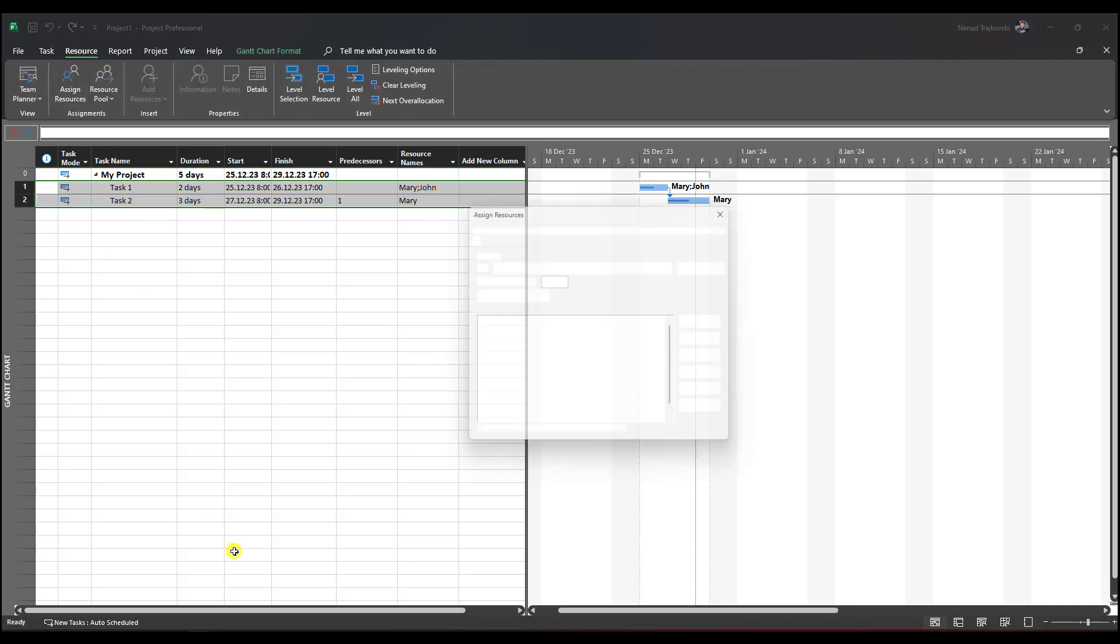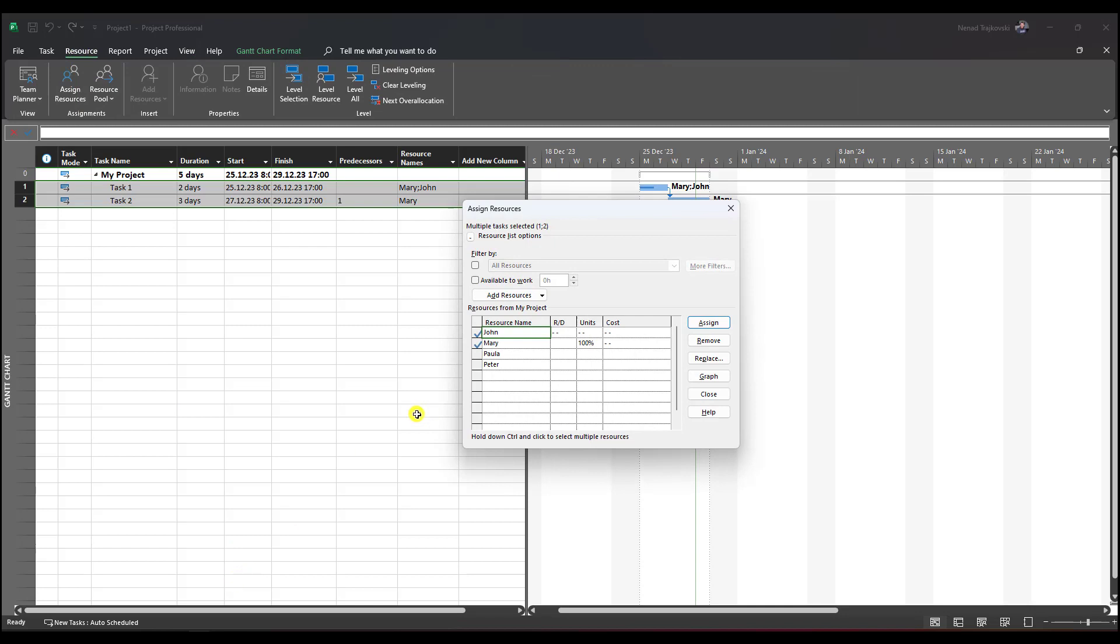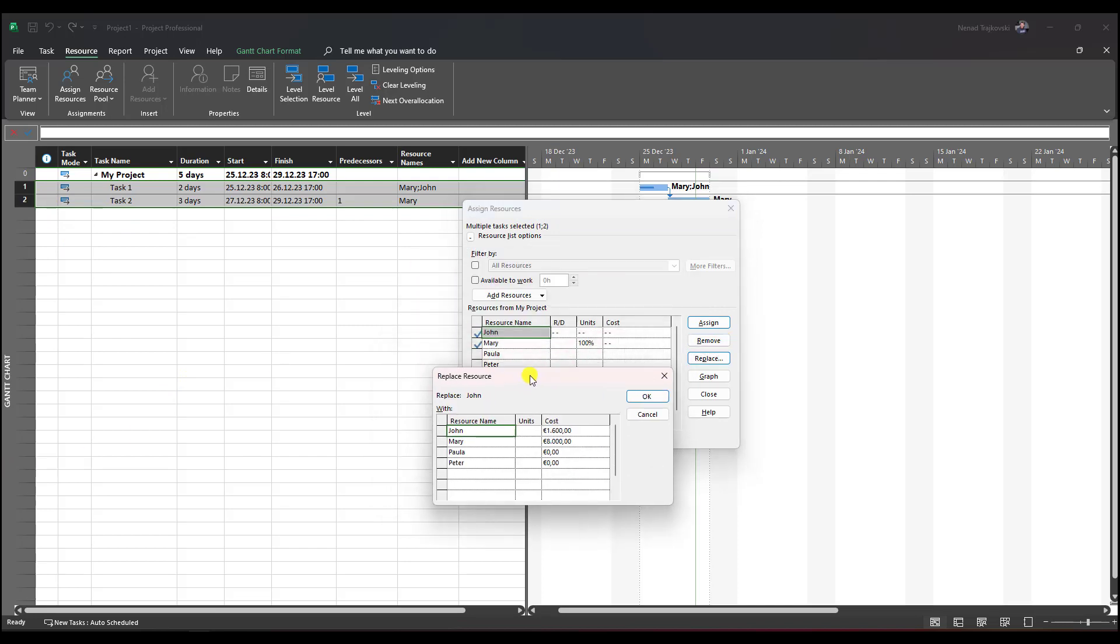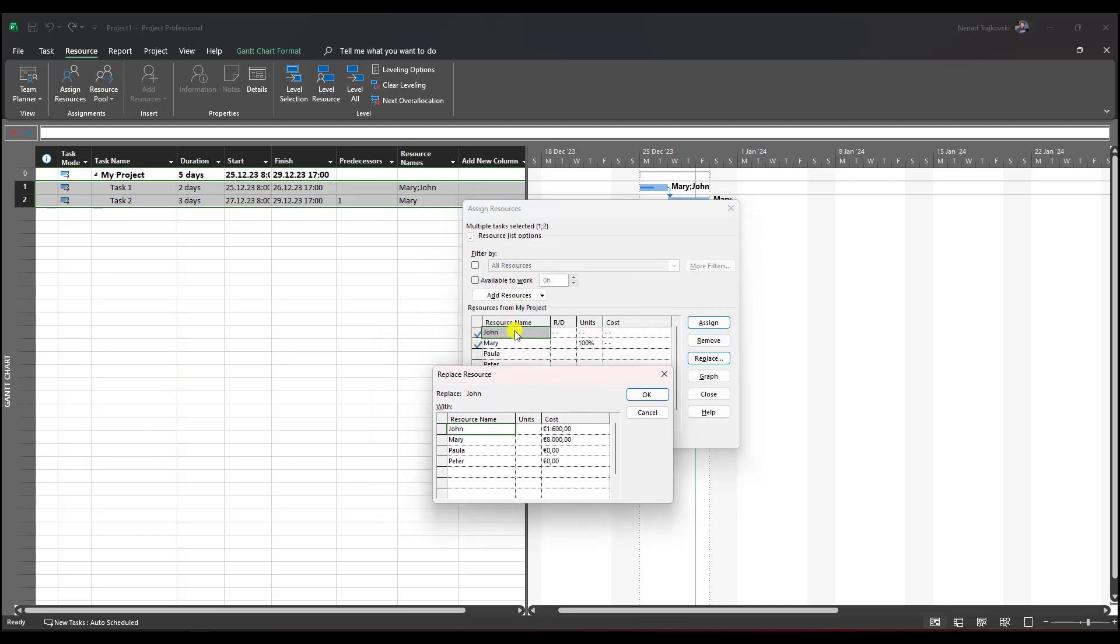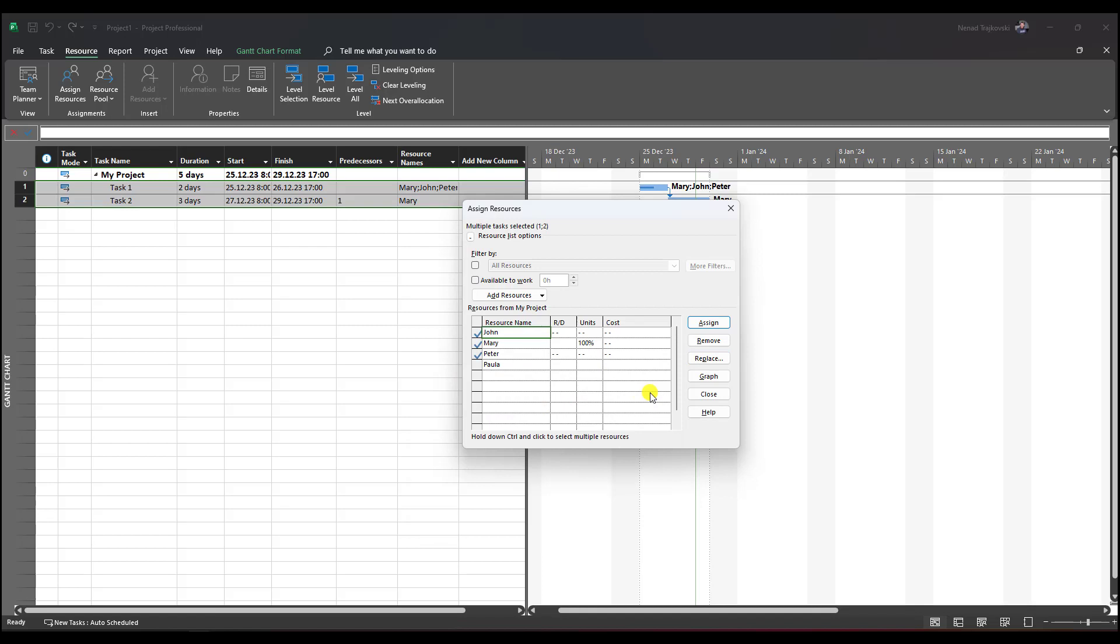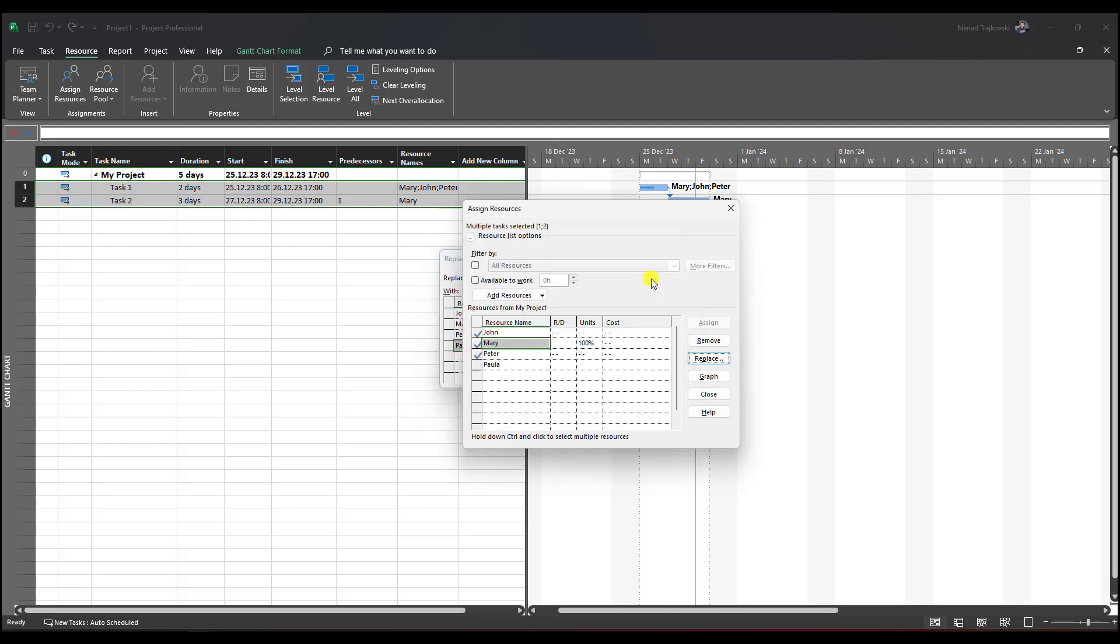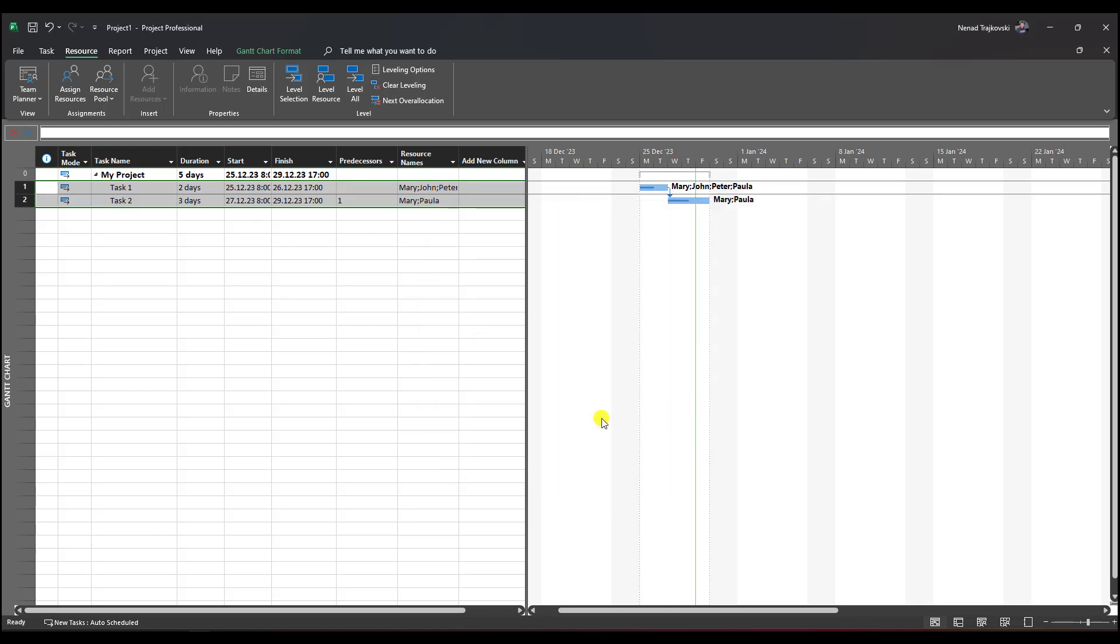You'll see here that I have multiple tasks selected, one and two. I'll go to Replace. John is selected and will be replaced by Peter, and I'll click okay. Mary will be replaced by Paula, click okay, then close.